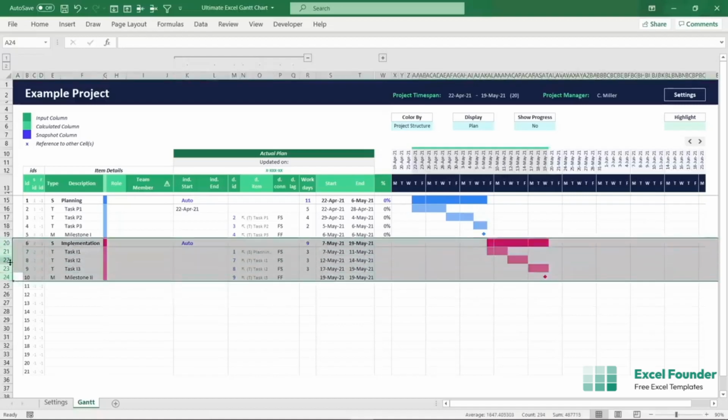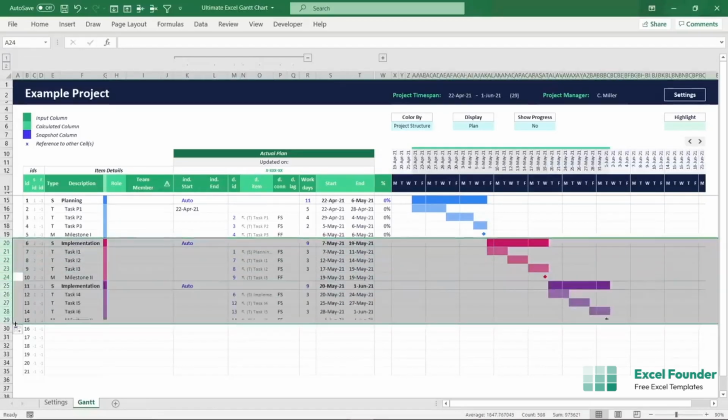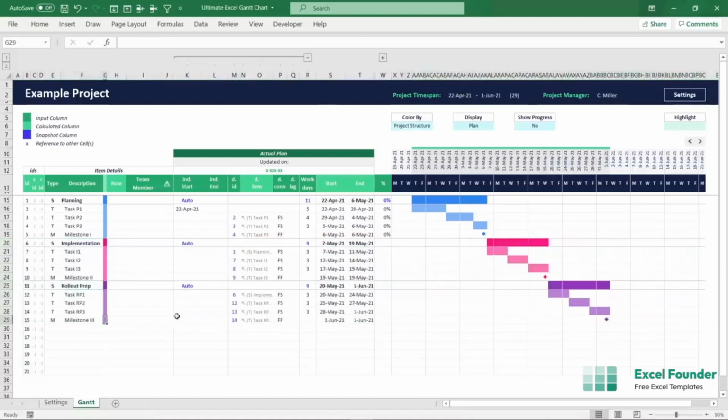After that, it will only take seconds to add another consecutive stage that will have the same forward scheduling dependencies with the stage start date tied to the other stage, and thus making the time span grow into the future whenever the number of required workdays is increased.